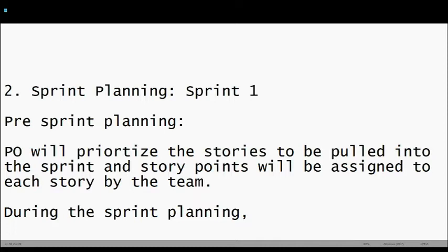This will impact how smooth your daily stand-ups are, because if the clarity is not there, every stand-up will turn into a refinement session. The velocity will be impacted and the team will just be jumbling and fighting with each other on understanding what needs to be done. There will be so much back and forth and so much waste of time. So this is very, very important.